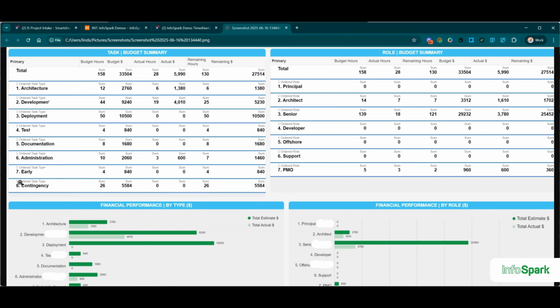That's one of the special things about Harvest: there's not too many timekeeping systems where you need to allocate your time not just to the project that you're spending time in, but also specifically what task. And that is not optional in Harvest, and that makes it quite special. And it's really important because you generally want to get into a little bit more detail rather than knowing, yes, I've logged 158 hours against a project, because this is the actual hours.